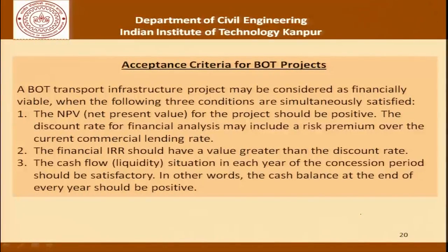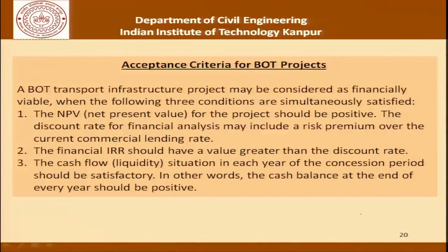A BOT transport infrastructure project may be considered financially viable when three conditions are simultaneously satisfied: the NPV — net present value — should be positive, with the discount rate for financial analysis including a risk premium over the current commercial lending rate; the financial IRR should have a value greater than the discount rate; and the cash flow in every year of the concession period should be satisfactory — meaning the cash balance at the end of every year should be positive. These relate to what we have covered in detail during construction economics.